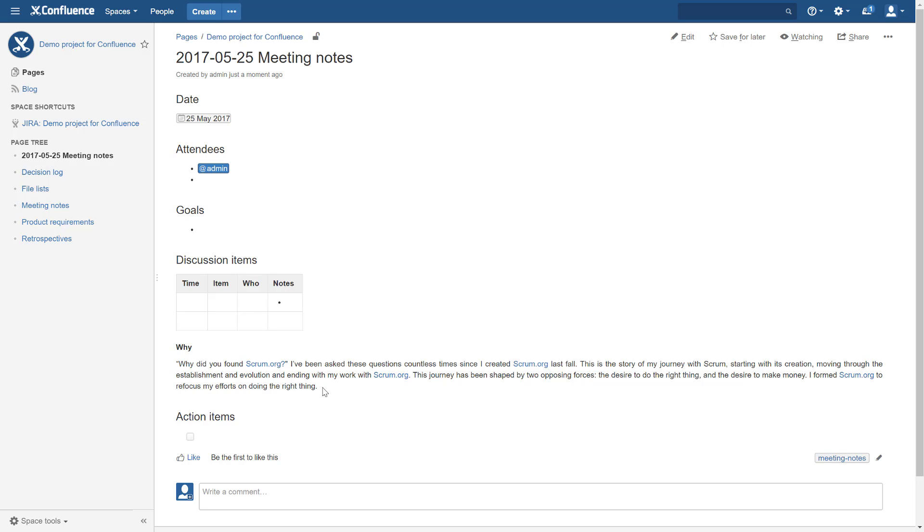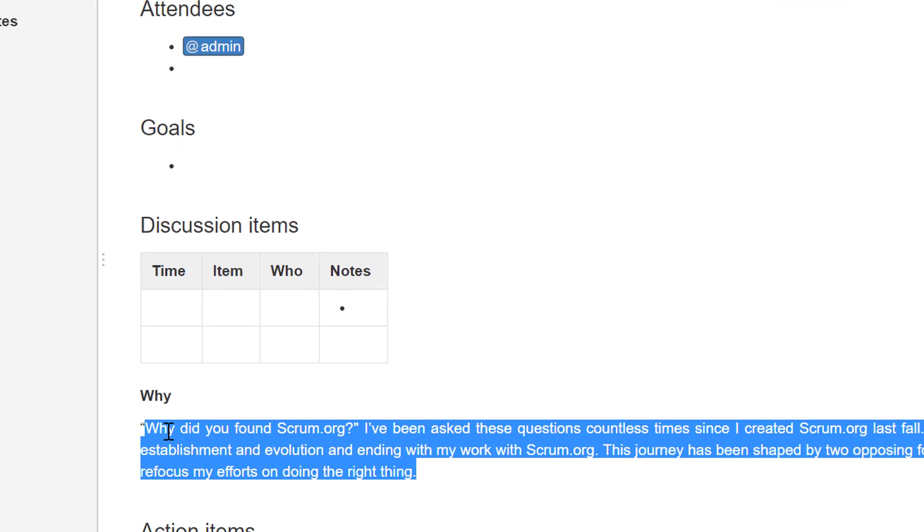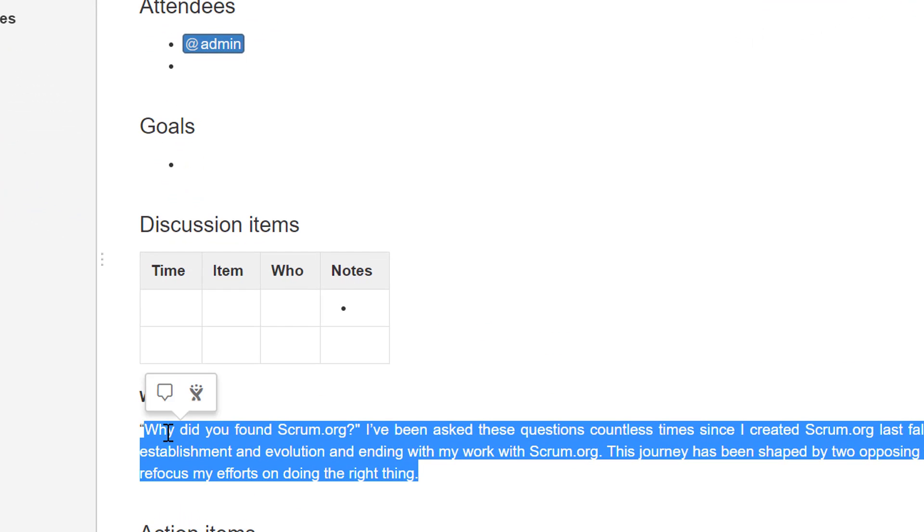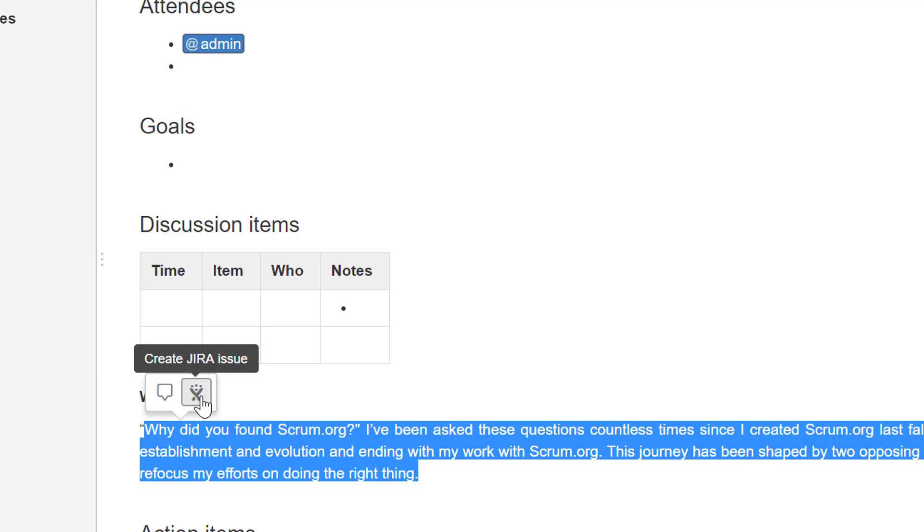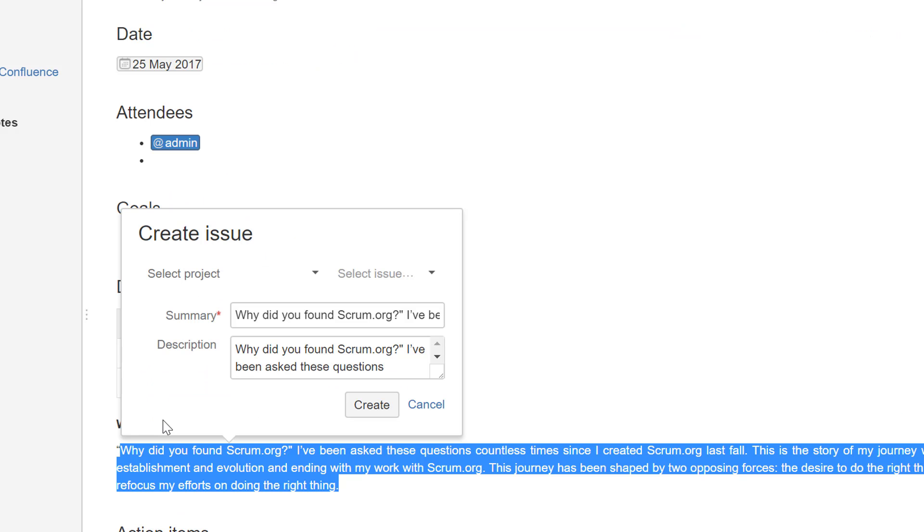How to do this is very simple. You need to highlight the text, wait a little bit, and you're going to see a small icon. And that's how you're going to create a new issue. But before you do it, I'm going to give you another tip. Sometimes people ask me why I can't see this option - because you need to be logged on to Jira at the same time. If you're not logged on to Jira, you're not going to see it. You need the Confluence to know you're also logged on to Jira. Because we are, I'm going to create, yes. And look at this.